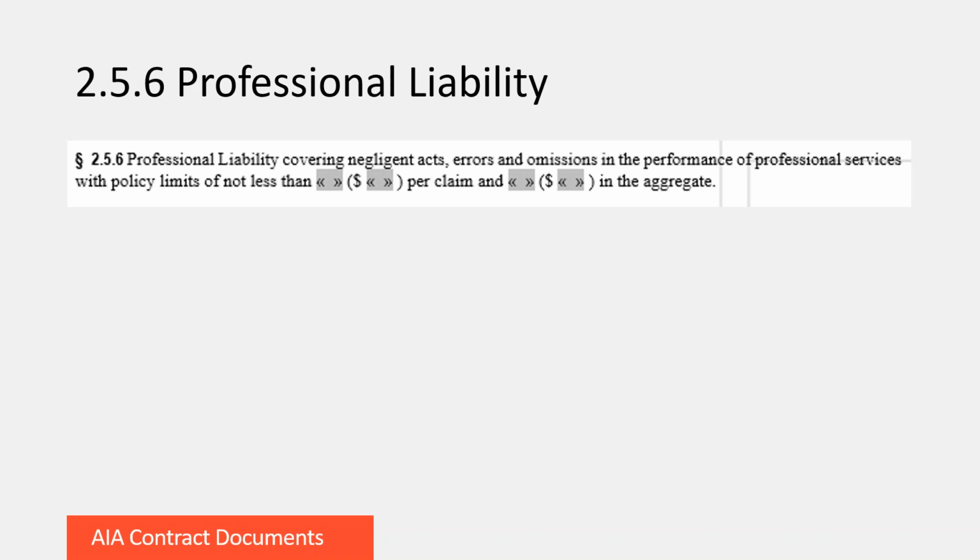Professional liability may tend to vary, and you'll want to make sure that you're referring to any of those previous insurance requirements to be sure that you're entering this amount, because sometimes the insurance requirements may be different for what you're required to provide for the project versus what you typically carry as your practice policy for professional liability. So if those numbers are different, you want to make sure that you're complying with the project requirements for the numbers that you enter here, not necessarily the limits as they're stated on your policy for your entire practice.